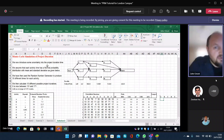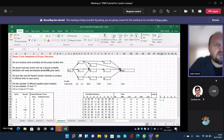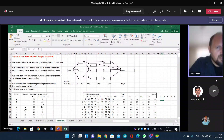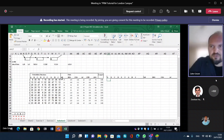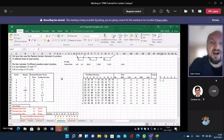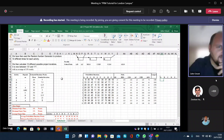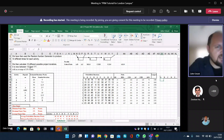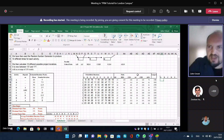We now introduce some uncertainty in the project duration time. We assume that each activity time has a normal probability distribution with mean and standard deviation times as given. We then used the random number generator — we simply apply it with the NORMINV formula, which generates random inverted numbers. We then calculate 10 different possible project durations, and it is now between 131 and 171.